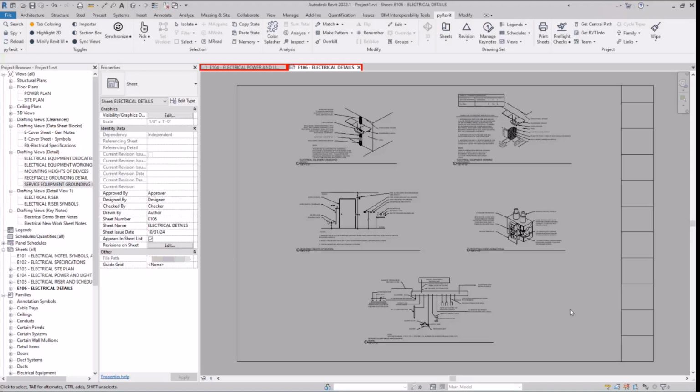Like, they're not going to look at both and say, hey, these are different, what should I use? They're going to pick one, and the one they pick might not necessarily be right. Yep, that's very accurate. And if these are legal documents and they're contradicting and the contractor picked one, most likely the court's going to side with the contractor, because best I remember, the courts favor the person that didn't write the contract. So, yeah, I completely agree with that statement.